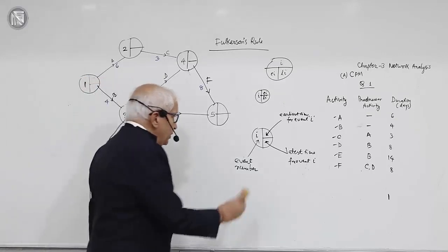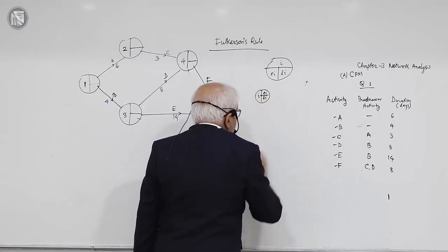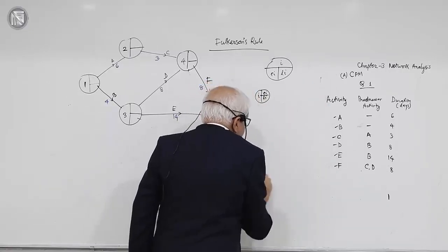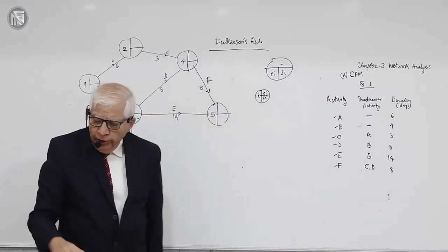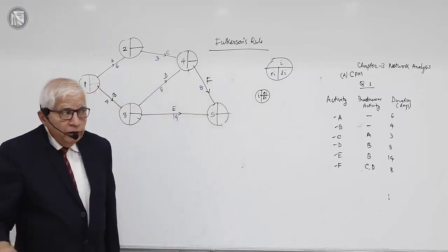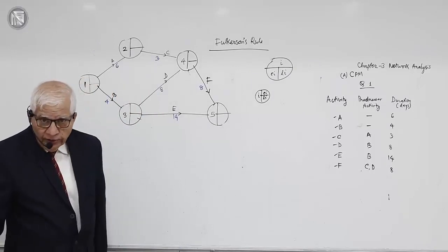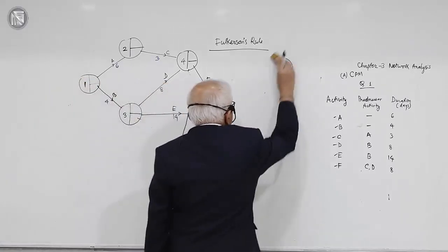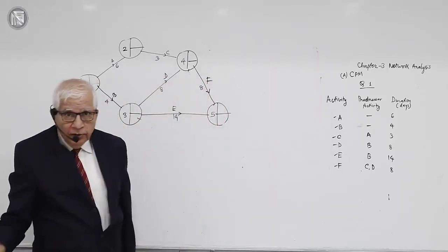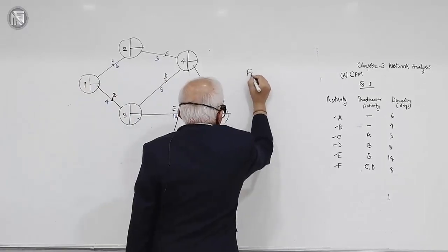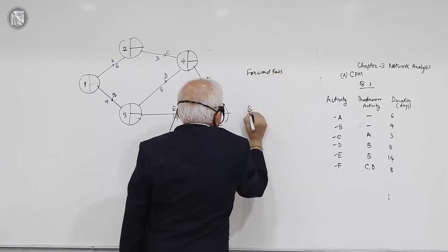This is the nomenclature that we'll use, and we'll now complete this network diagram, because what is missing is EI and LI. At each event number, what the earliest time and the latest time are is yet to be written. So we are going to calculate this earliest and latest time using a certain process. This process is known as forward pass and backward pass.